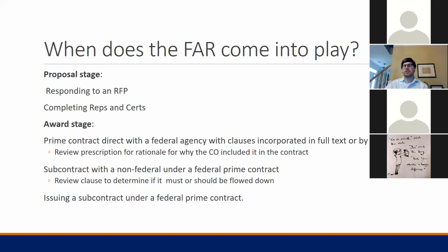In the situation that I described earlier, where we're subcontracting with a prime contractor that is then contracting with the federal government, the analysis is very different in that we don't have a legal agreement with the federal agency. We have a legal agreement with their prime contractor. And so whether or not a FAR clause is applicable or just useful to have in a subcontracting relationship is much different than in a prime contracting relationship.